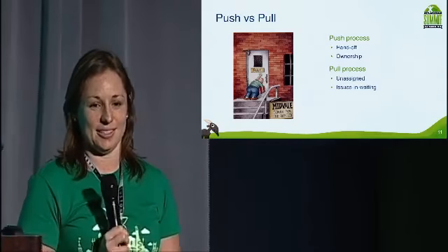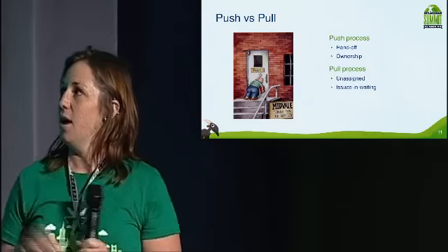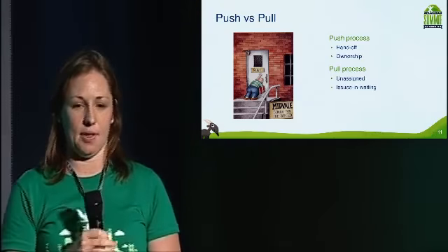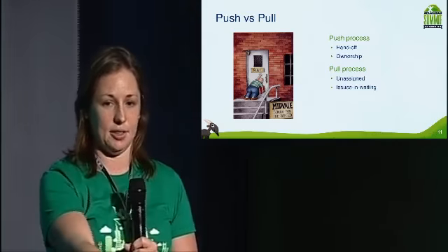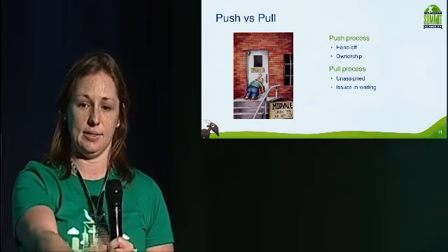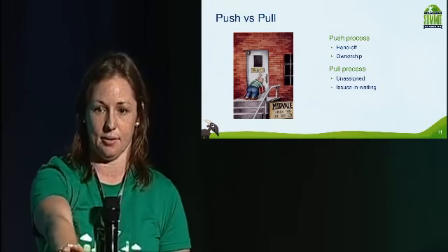So this first concept is the concept of push versus pull. So a push process is something where I've created this task, I then assign it to the next person, and now it's in their hands. Somebody always owns something until I manually hand it off to somebody else.